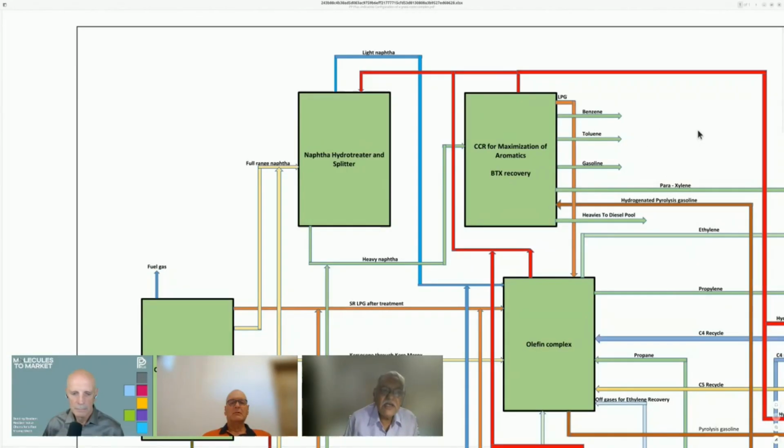This helps me in configuration optimization much better, much faster, because I don't have to do multiple licensor selections, so to say. The caution is in India, we don't do this thing. In India, public sector undertakings, we do individual selection only, and then select the best based on the NPV. So that is that.